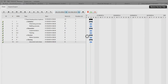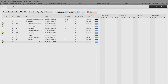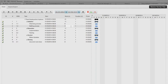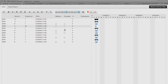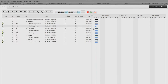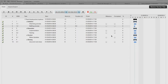Let's open this up a bit more — we can see we've got work hours and duration. The lighter grayed-out items are the top-line items. Right now we have 48 hours total, because when you add an item it defaults to eight hours and one day. We can change all of those — the chartering process is going to take us a full day, and the staffing process will only take four hours, so we'll set that to four hours and 0.5 of a day. But staffing really can't happen until the chartering process is done.